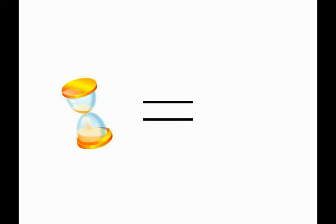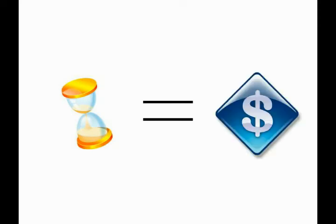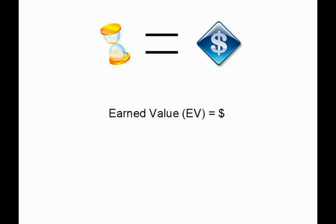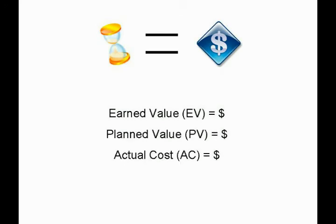The basic premise is simple: time is money. Therefore, your three core metrics — earned value, planned value, and actual cost — are all expressed in dollars.